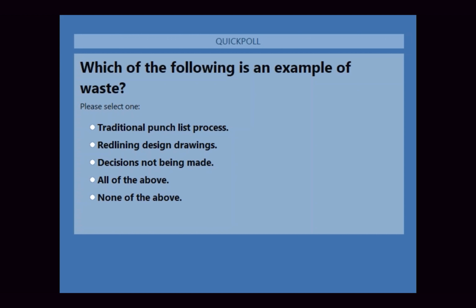If I send a millwork drawing only to the millworker and not to the electrician, I've under-processed that particular document, because the electrician needs to know what's going on with the millwork on the project site, believe it or not. This is something I learned early on in my career: I didn't send it to the electrician and I got them barging into my trailer saying, what the heck? Well, they need to know everything that's going on at the project site because they have to coordinate everything with all the electrical outlets and all the data drops. So I really think it's either over or under processing more likely than transportation, is what I would classify that as.